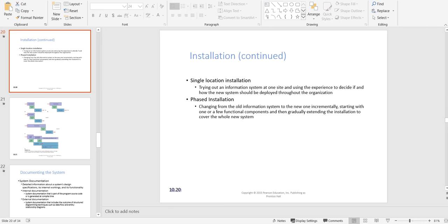One of the key benefits of this is that since you are releasing your application in a phased, incremental manner, maybe 25% of the application will be released on January 1, 2020. What that also means is that the 25% of that application needs to be developed and tested by January 1st, 2020. So your system development can also be done in a phased way.